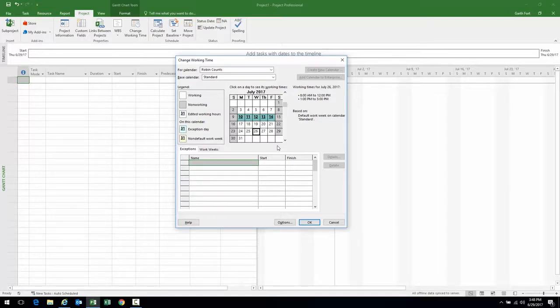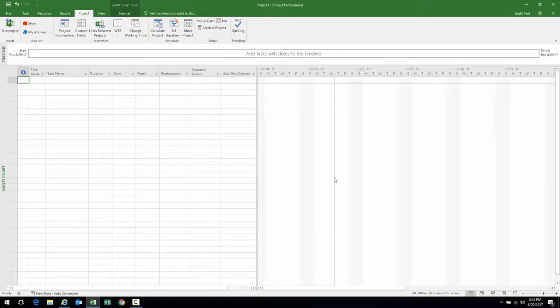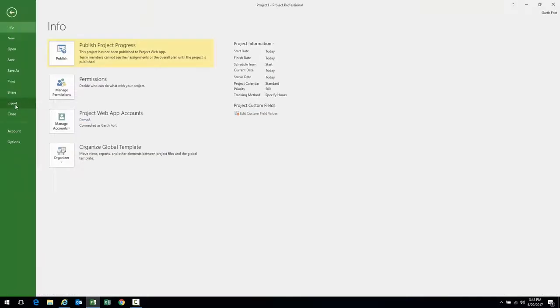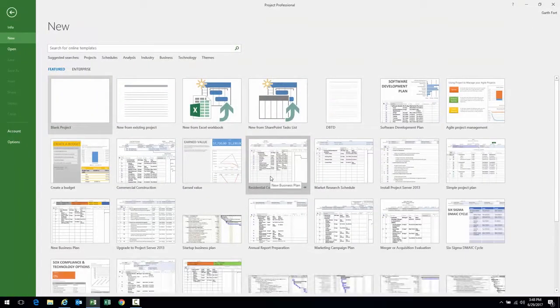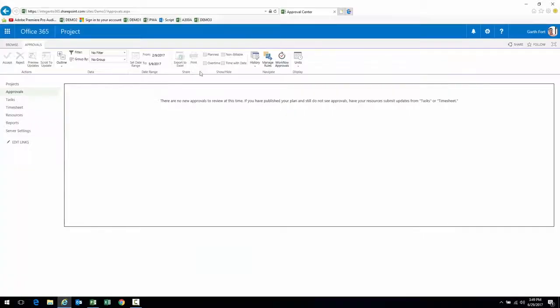That is the one that is initiated by your team member if your organization happens to be using timesheets. In this particular case, let's say that you want to utilize another method. You're not using timesheets, or your particular organization isn't allowing team members to submit updates for administrative or operational activities. The other way to do that would be initiated via the Resource Center within the tool set. So I navigate to Project Online, navigate to the Resource Center.